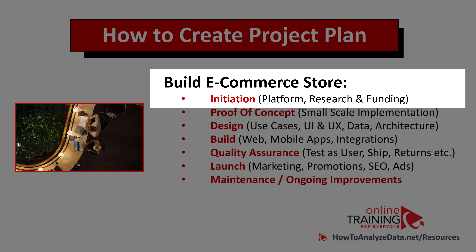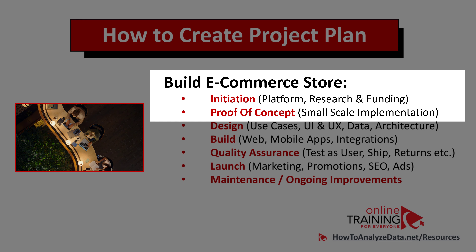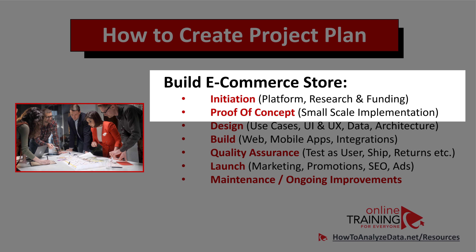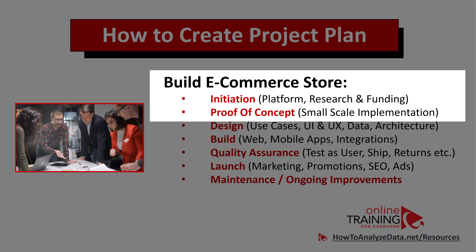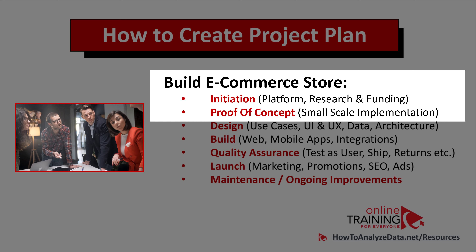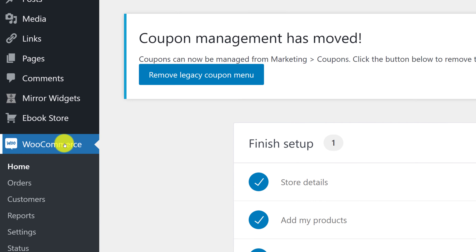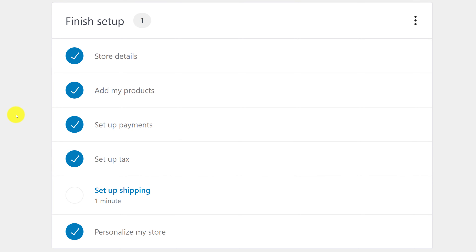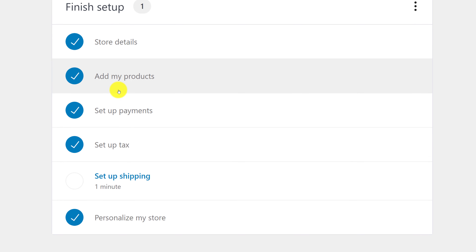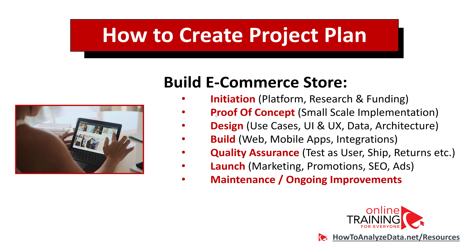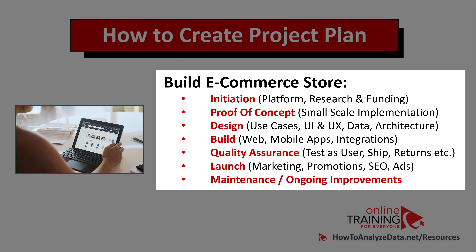During the proof of concept phase, you do a small-scale implementation. For example, if you're building an e-commerce store, you might go live with a small store selling just 10 products instead of 100, or selling the full range but presenting it to a smaller list of customers. I'm in WordPress right now and I have access to the WooCommerce plugin. Finishing the store setup might be the proof of concept — to set up a successful store you need to define store details, add products, set up payment methods, set up taxes, and personalize your store. Often, the capabilities of a plugin like WooCommerce will define the tasks of what you need to do for the particular store.